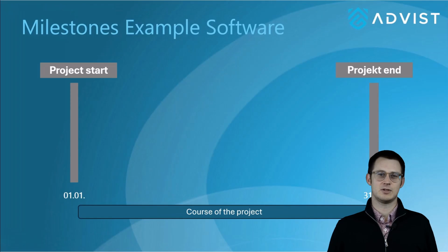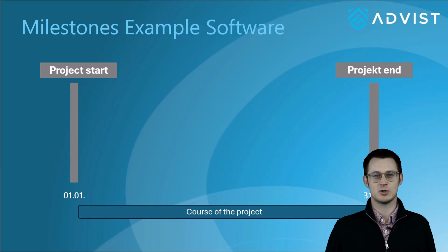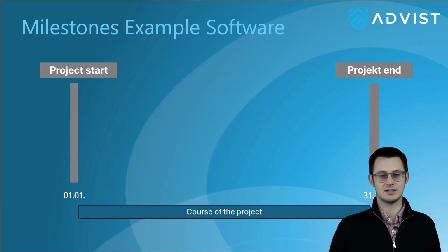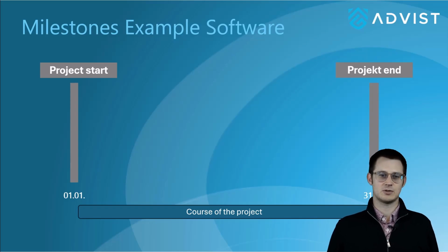In the case of a simple example, it is important to follow some basic principles to ensure that the project can be carried out successfully and efficiently. First of all, the milestones should be clearly defined. Each milestone should describe a specific, verifiable outcome that is clearly measurable. In this way, progress in the course of the project can be objectively evaluated. Practical tip: if possible, never set the milestones on the day of the week, Friday. Otherwise, Saturday is often inevitable and you have no buffer left.